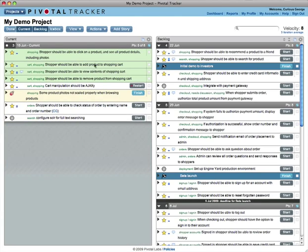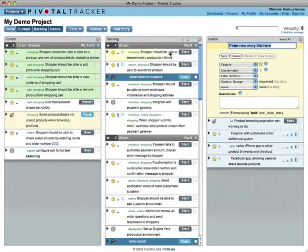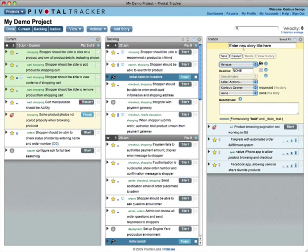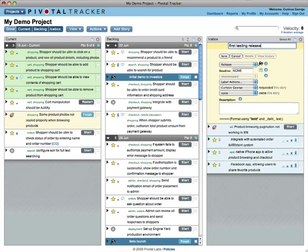Most stories are features, but there are also bugs, chores, and releases. These aren't worth any points, but they help you keep your team appraised of everything that is going on or needs attention.